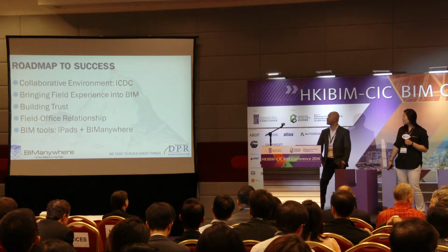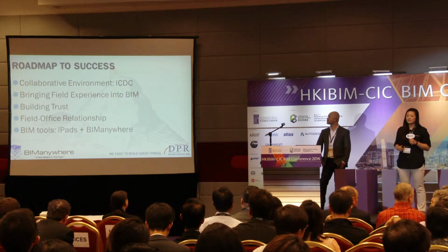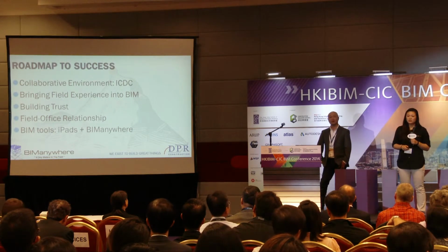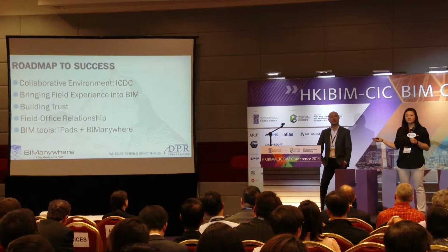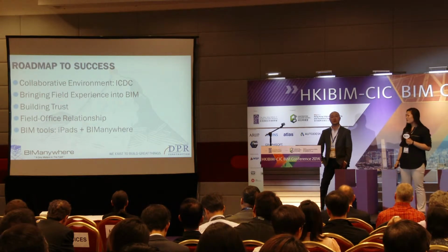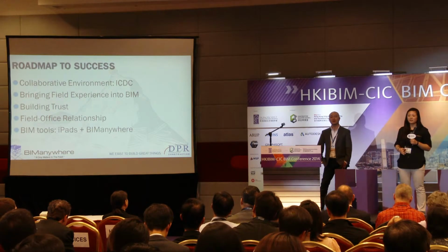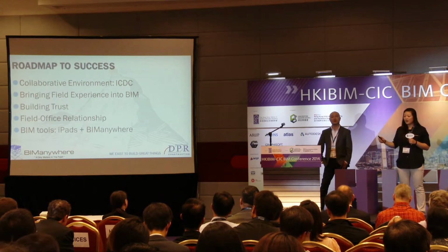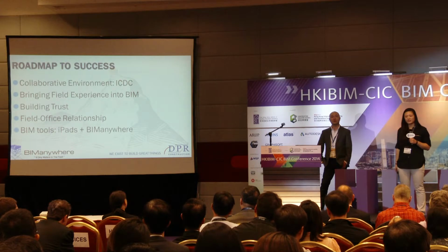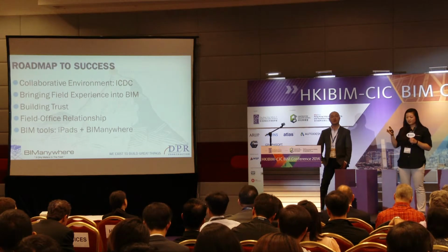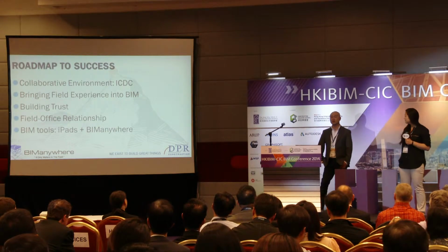Building trust. With our collaborative environment, we really needed to stress building trust in the model. If you have a model that no one trusts, no one's going to use it. So it's getting upper management to say that, hey, we're going to build everything per the model. You have this much construction tolerance, and everything installed in the field needs to be within this tolerance to the model.